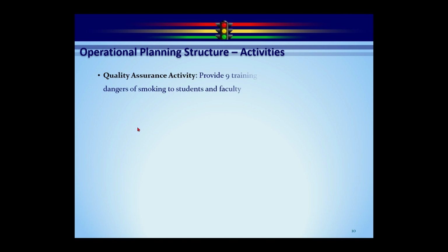Our second type of activity, and it's maybe a little backwards because this is the least used type because it's very, very specific, is the QA activity. The QA activity does 2 things. It repeats, so we have a frequency that we're setting. In this case, it's monthly. The frequency can be anywhere between weekly and every 5 years if you wanted to. Typically, we don't see this used more than maybe once a year at the outside, quarterly, monthly, that sort of thing. Monthly is usually pretty good.